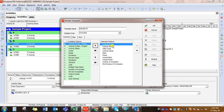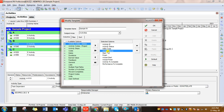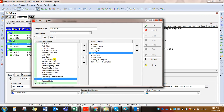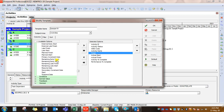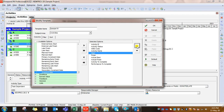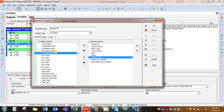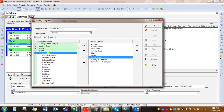Here we have Activity ID, Activity Status, and WBS Code — these three fields are very important and are required by default; you cannot remove them or it won't work. Activity Name is optional — you can keep it as a reference. Then we have Start and Finish under the Dates section. I am keeping Start and Finish here and will explain why, but they are not useful for our purpose.